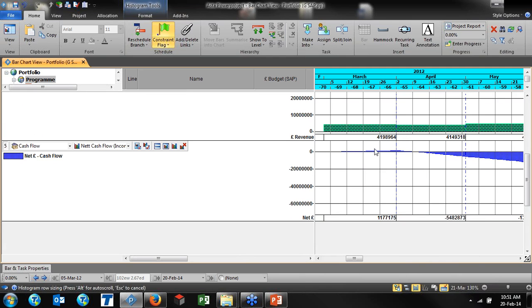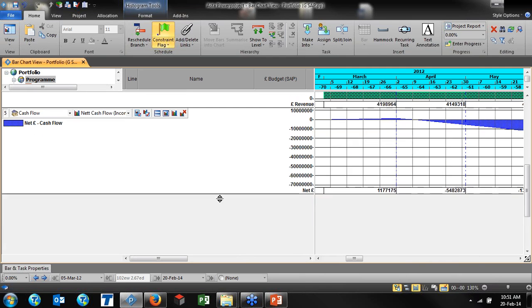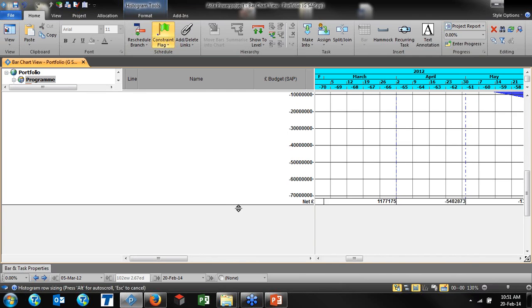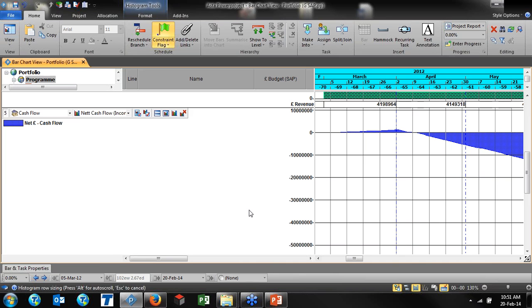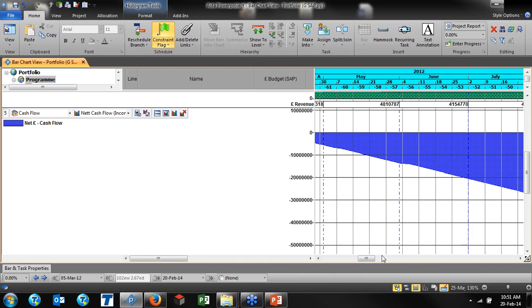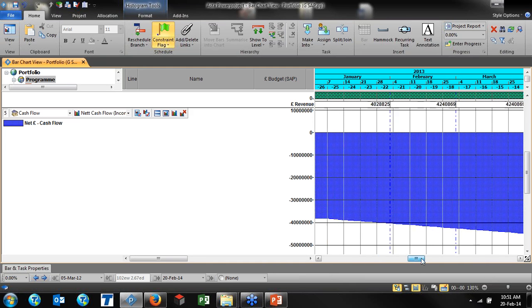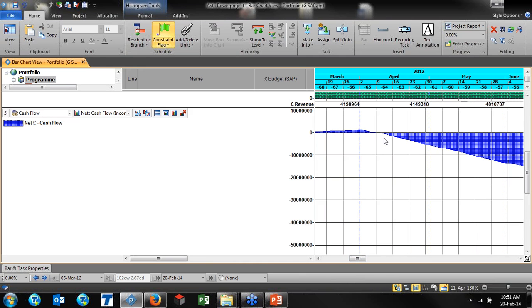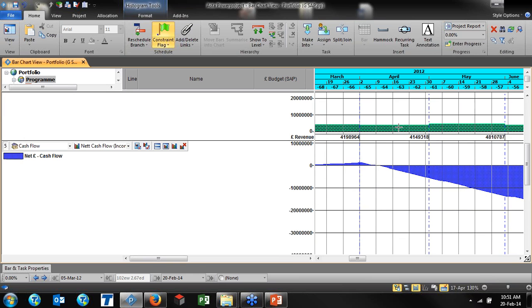Please see now, at this point in time, I can add more value. Now I can see the cash flow that I bring from my SAP. At this point I am in plus, but if I go like this, after April I need to have more cash because I need credit or I will be in minus, so I need to take some decisions. And if the data is wrong in the SAP part, you can also check that part, because here you have visibility to see it.